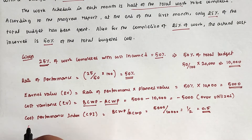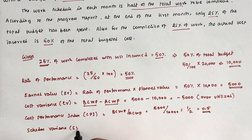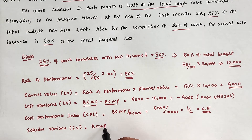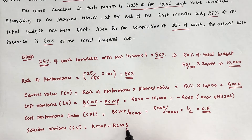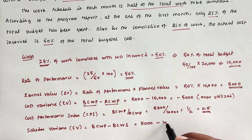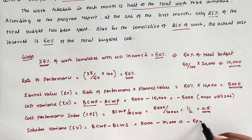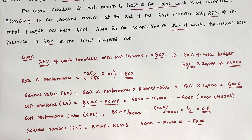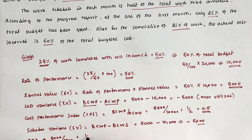Next is Schedule Variance (SV). SV = BCWP minus BCWS, that is Budgeted Cost of Work Performed minus Budgeted Cost of Work Scheduled = 5,000 minus 10,000 = minus 5,000. The project is behind schedule. The Schedule Performance Index (SPI) = 5,000 divided by 10,000 = 1/2, meaning work progress is half of what was scheduled.